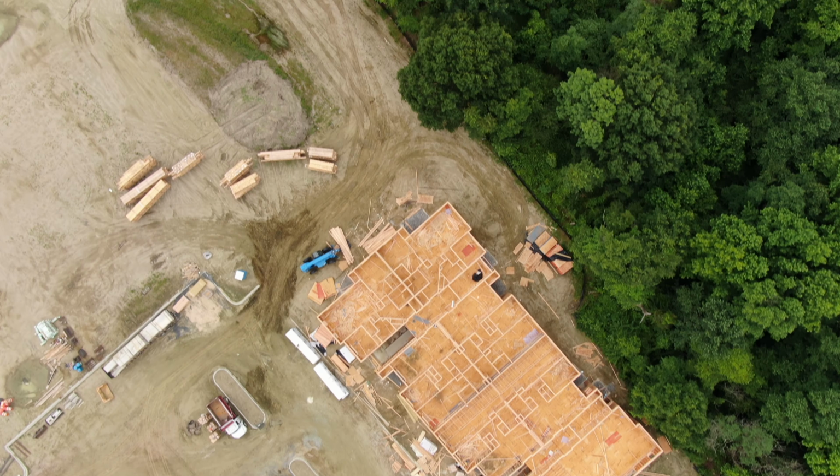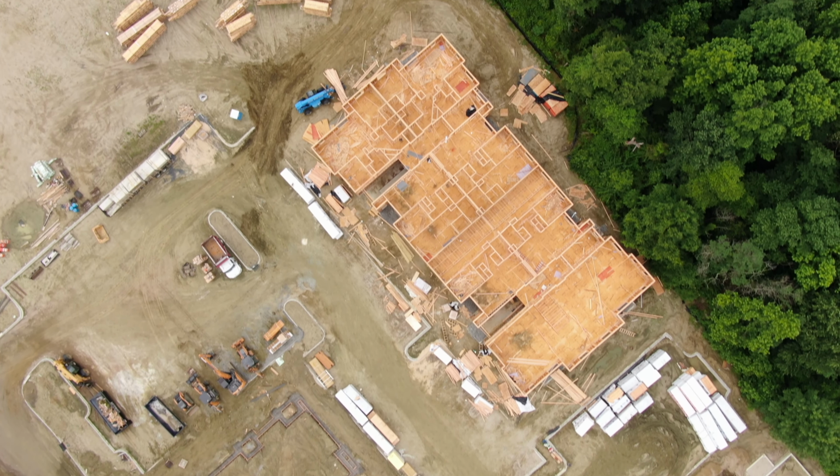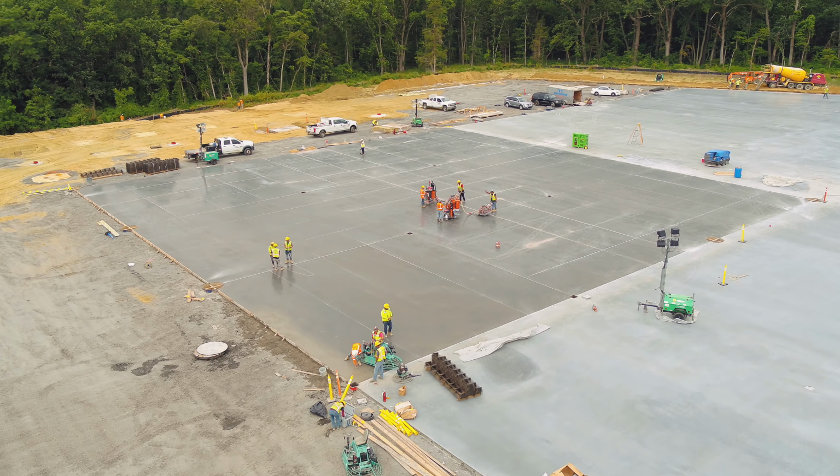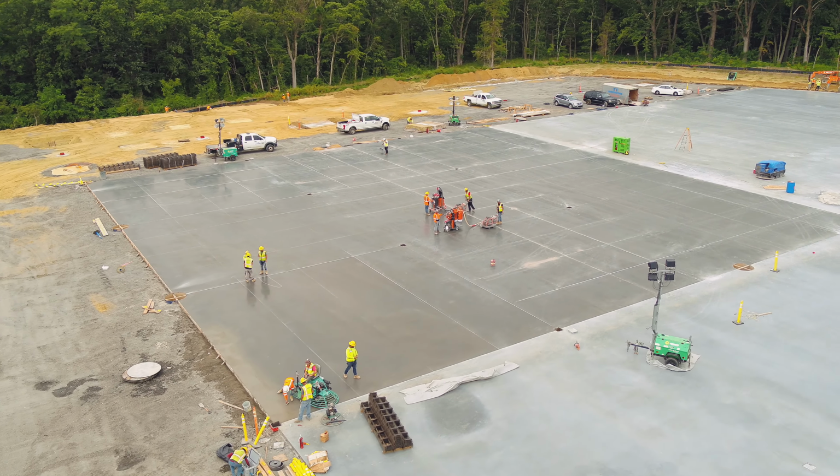Having the drone data is also a huge bonus for sending it out to the clients and investors to keep them informed during the building process. And having these consistent images can be super valuable for solving potential disputes. Doing periodic orthomosaic or 3D maps provide a record for any mistakes or blames that may arise. So you can look back and prove, no, we weren't behind, but here is who was.